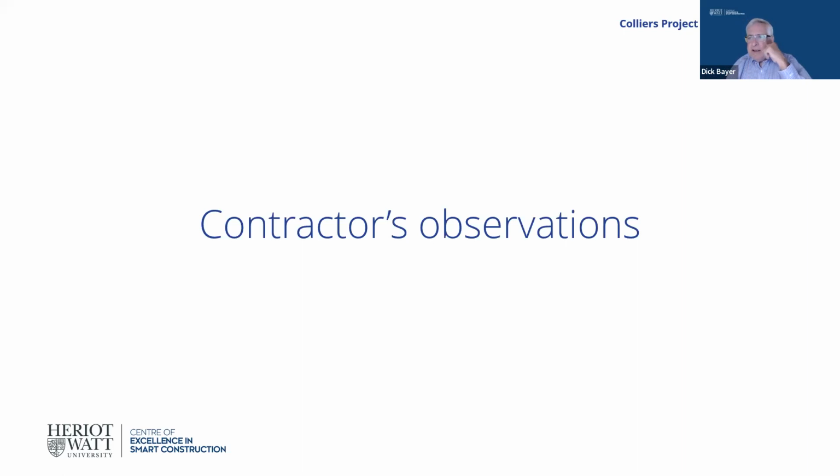In the US and Western Canada, they use the Howard Ashcraft model, which is a model that's been developed by Hanson Bridge at his law firm, and that's a widely used contract. The Associated General Contractors in the States have developed a model called Consensus Docs 300. And then the American Institute of Architects have developed another contract called their C191 series. So all of these are available. I'll write down those references in the chat.